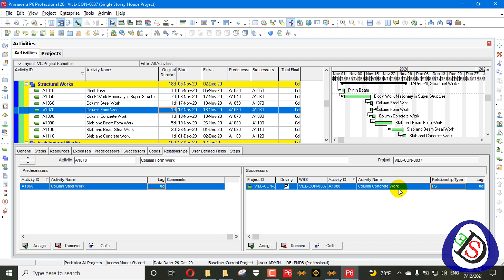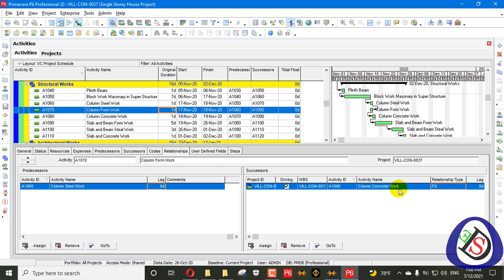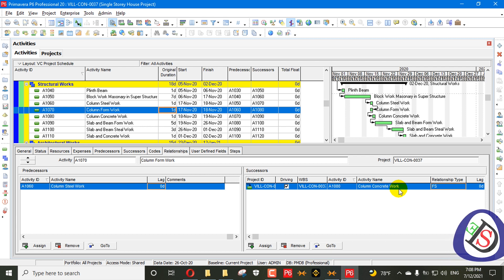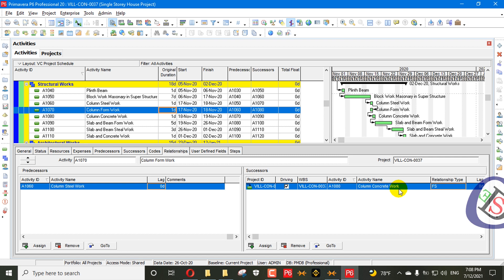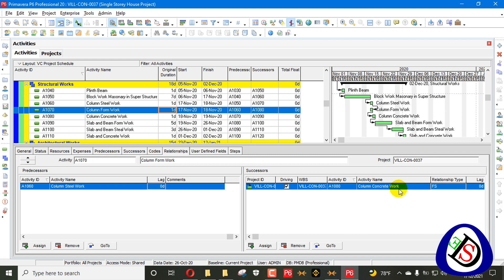Today we will discuss guidelines for dangling logics. Most dangling logic rules say that all activities except the very first and the very last should have both a predecessor and successor. People believe every activity should have a predecessor and successor as a basic rule, but actually we cannot say that an activity without any relationship is automatically a dangling activity.